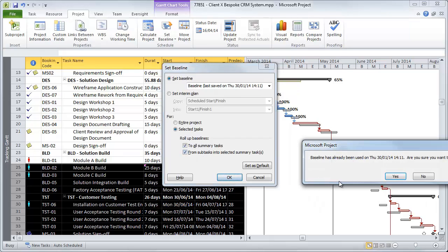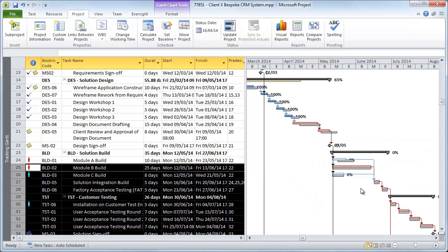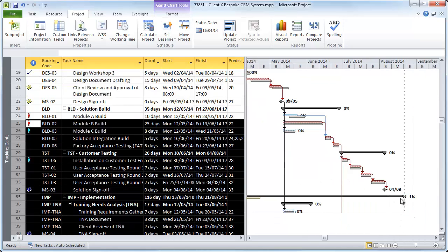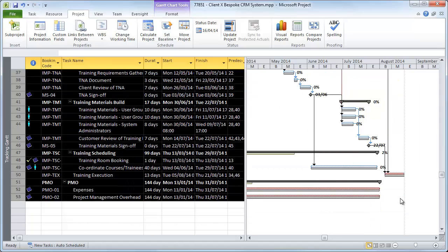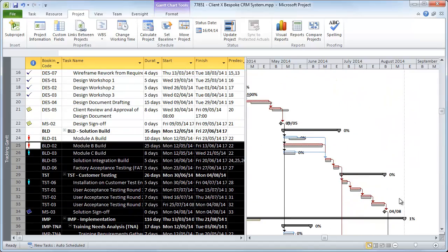Going back to the schedule, we can now see that the tasks have been rebaselined. The new duration has been applied and our schedule and baseline dates are now perfectly aligned for those tasks. However, prior to setting the baseline for these tasks, we had a positive variance of 5 days, and that showed that the project was performing well. We were on target to deliver ahead of schedule. Our worst case scenario, if the project faced issues later on, we had 5 days contingency to call upon without impacting the project delivery date.